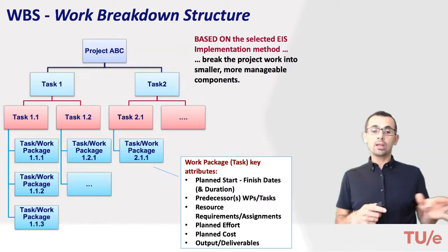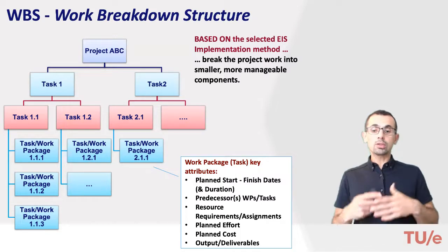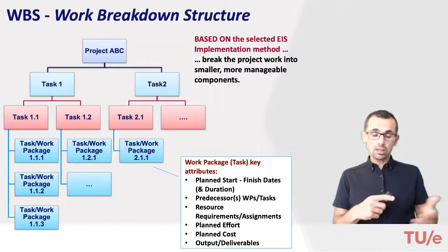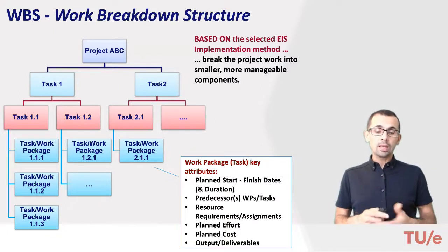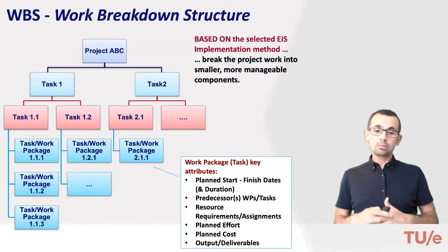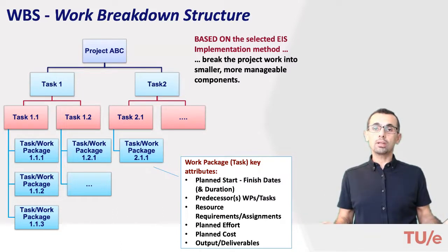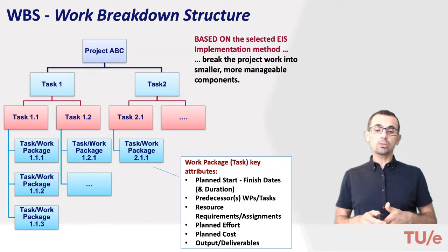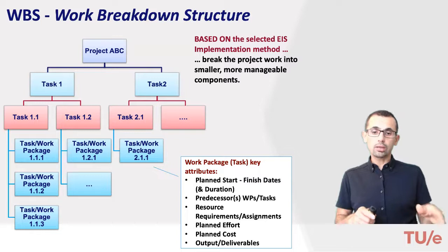And there's also the monitoring perspective. There we also need the actual numbers, so that we can see if the actuals are aligned with the planned ones. So the actuals are mainly for the start and end date, effort and cost values. These numbers typically come from the timesheets that people, resources, post at a certain interval, like weekly timesheets or sometimes monthly timesheets you post, and then we calculate the actual values and then see whether we are doing really all right with respect to the plan.